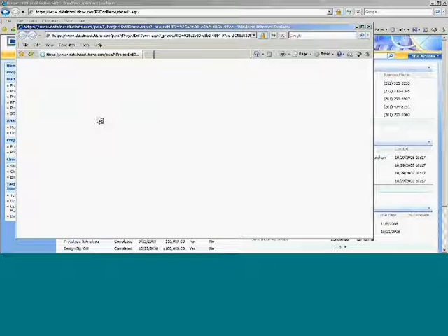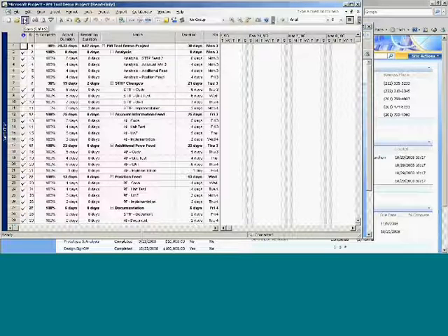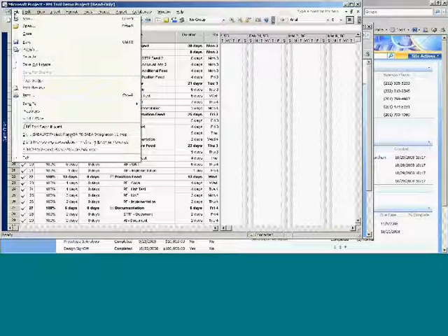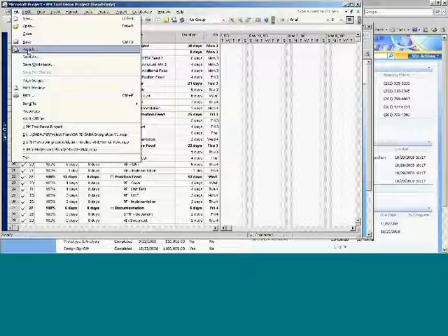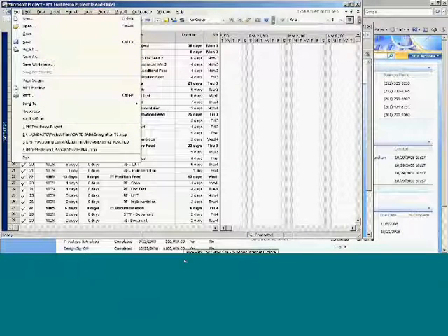He can save the project, and once he saves it, he has the option to publish it back to the server. Once it is published back to the server, all the team members, including the project manager, see the latest details of the project plan.